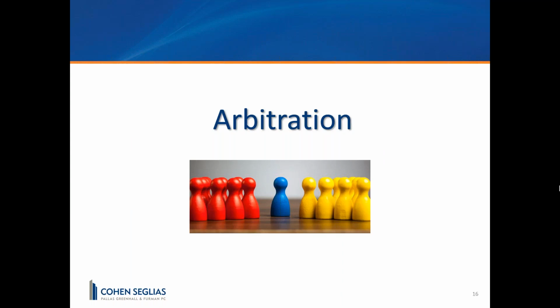So it's always very interesting to me when somebody says, hey, I'm going to have a binding mediation. A binding mediation is a process that doesn't really exist because, as Lisa said, the idea is to go back and forth with the mediator in a shuttle diplomacy style to reach a settlement agreement. It is a settlement process. The next step is arbitration, which is binding in most situations.